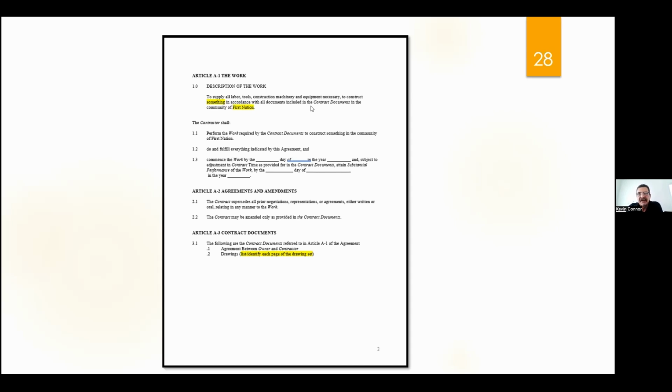So if I'm going to build a house somewhere, let's say this, I'm going to build a hotel. And I tell the owner, this hotel is going to be ready December 20th. And he then books all the rooms out from the 21st till, he's open for business. And in fact, I don't finish on the 20th. I finished on January 20th. Those 30 days, 300 rooms at $150 a night. He's lost some serious money because I did not finish the contract on the date I said I would. And again, a court would certainly support that if you could quantify your damage, right?